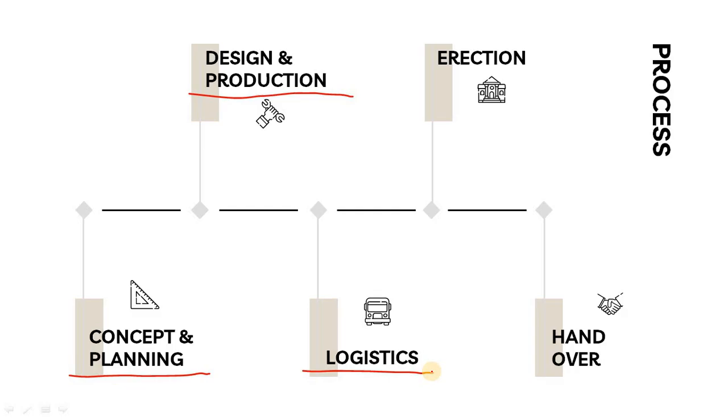After the logistics, when the transport reaches the site, if storage is available at the site, then all the loaded items will be stacked on the site and then erected. Or in another case, the elements can be lifted directly from the transporting trailer and erected on position.